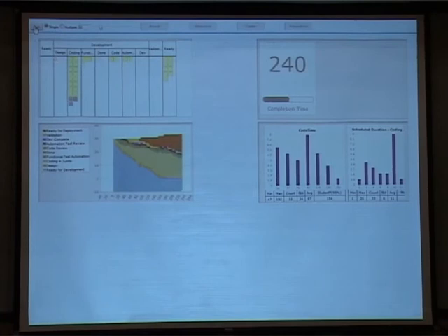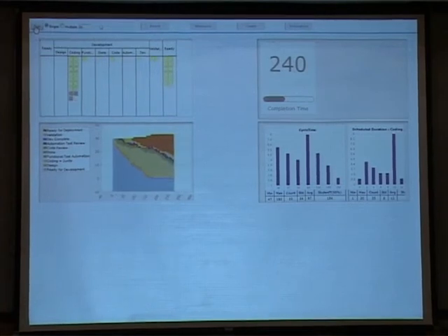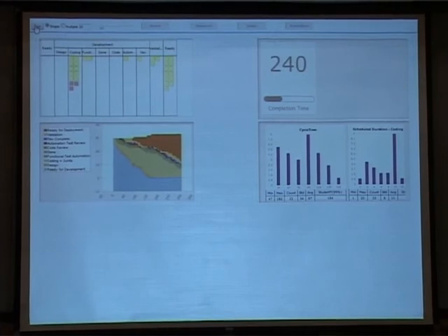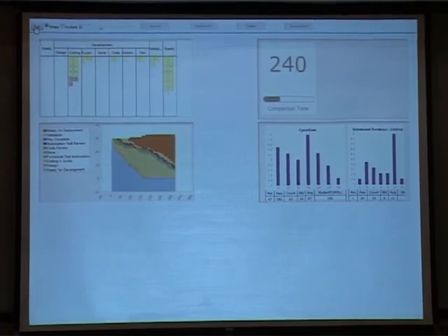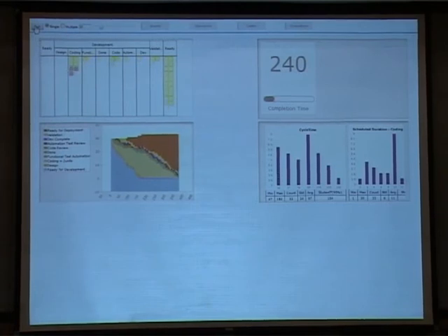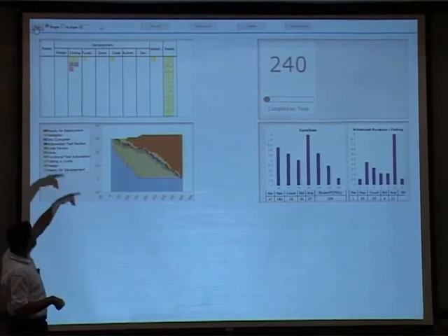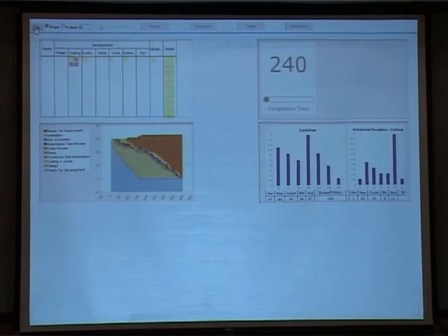We're trying to build what ifs in terms of: if this is my cycle time that I'm experiencing, this is the range of effort that work takes to get done in a particular lane. This is my team member profile, both in terms of numbers and their skill sets, and this team member can act on this lane. Then you can do a lot of these kinds of what ifs to say what is the most optimal load or team profile that I need to have to be able to make the best cycle time reduction. As you can see very clearly, the ready for deployment kept on increasing because as defects kept on getting added, obviously the backlog size increased.